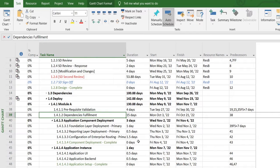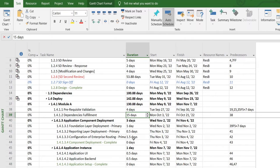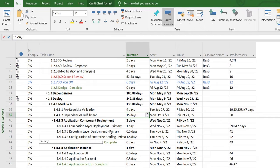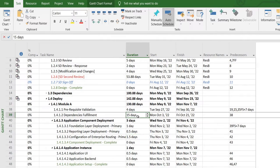For example, I have this task number 39 which is taking 15 days. However, this task I want to make sure should follow the 24-hour calendar instead of a standard eight-hour calendar.